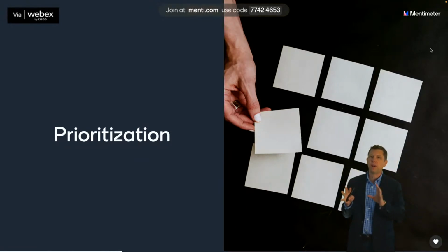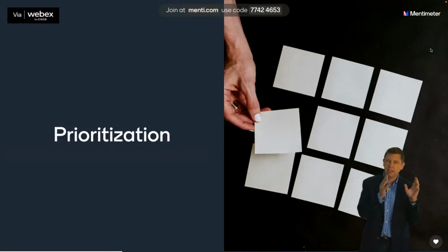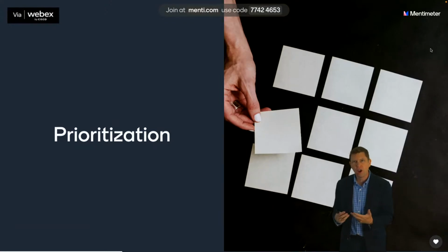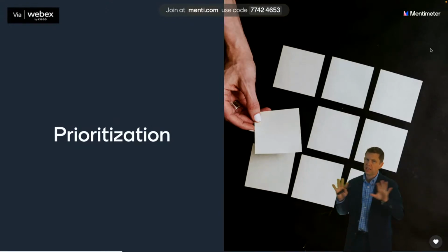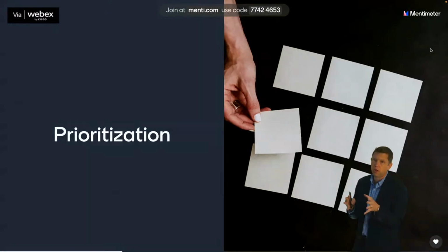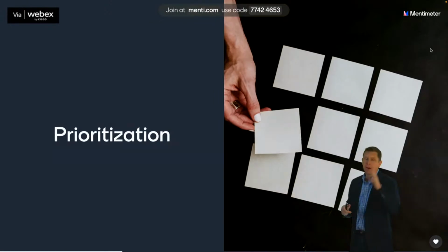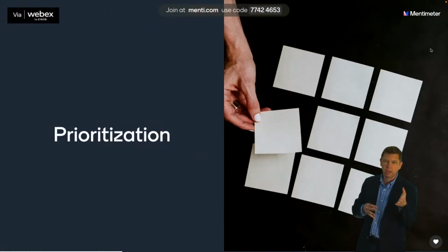So he created another bucket and said, these are the fast follows. So once we're able to process a bill and this is running live, these are the next things we're going to work on. And that kind of broke the logjam, and people were able to prioritize things better by saying, okay, you're recognizing that what I want is really important because you're not putting it in the third bucket. But I understand that we will increase our chances of success if we get something deployed and running sooner and then start iterating on top of it.